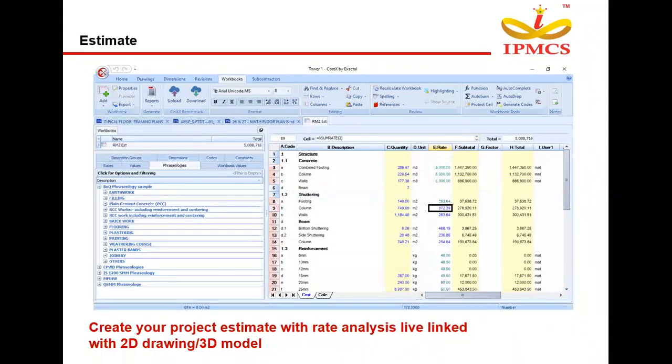Say if we take plastering or block work, brickwork, tiling works, all these works require cement. Cement is a major portion, a major quantity, in our calculation. So this cement rate has been linked with all the other different activities in our project. If the rate is changed only in the master rate list, it will be reflected in the entire project estimates, updating them to the present market rates. That is why quantities and rates are live linked with the source of their corresponding files.